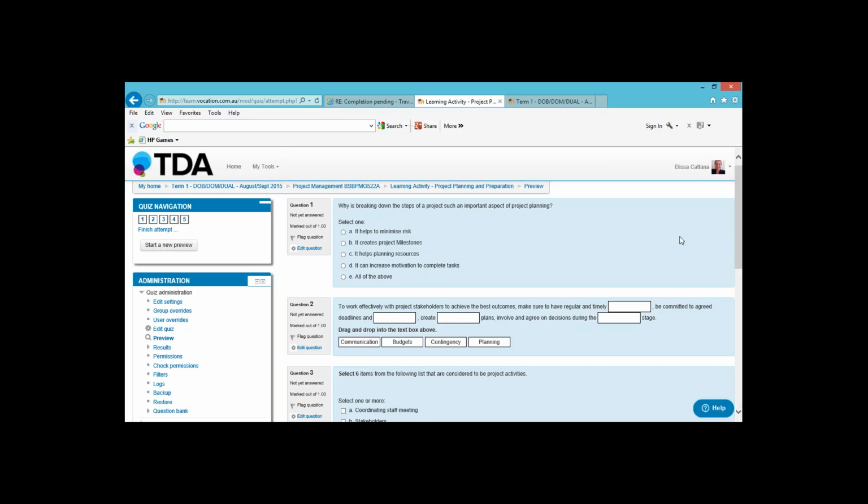It's also a risk management thing as well, Alyssa, because by breaking something down into smaller parts, you can do what I think is something that software engineers or engineers use the word decoupling. So in a complex system, you might have so many moving parts that are all operating at the same time, but doing a process of decoupling, which is essentially separating parts from one another within that system, it enables you to minimize risk, because if one of those parts fails or goes down, the other parts of the project can still run and still be independent. They're not waiting for that other thing to finish before they move to the next stage, that stage 2 or that stage 3.